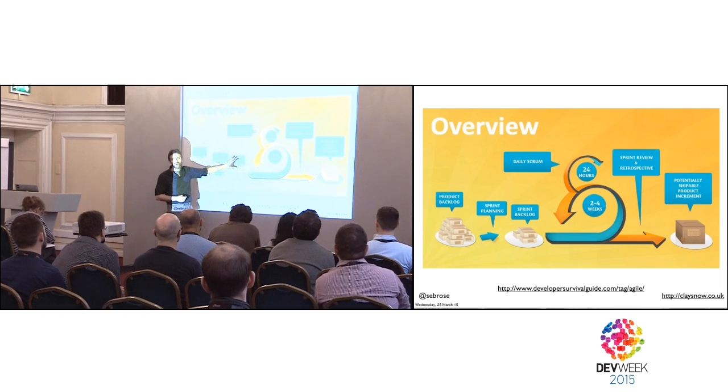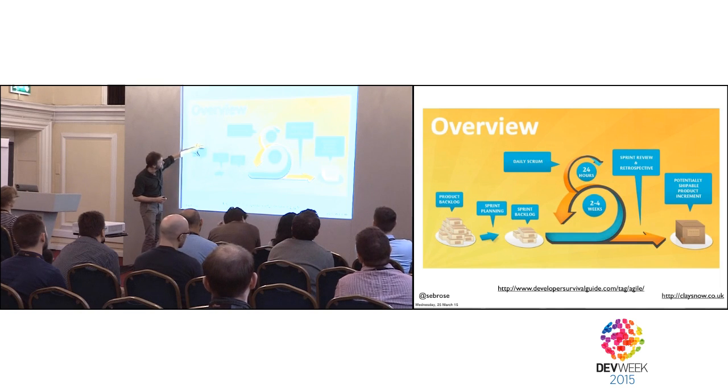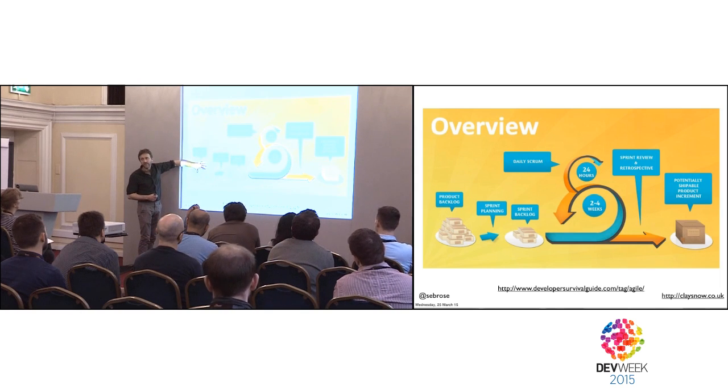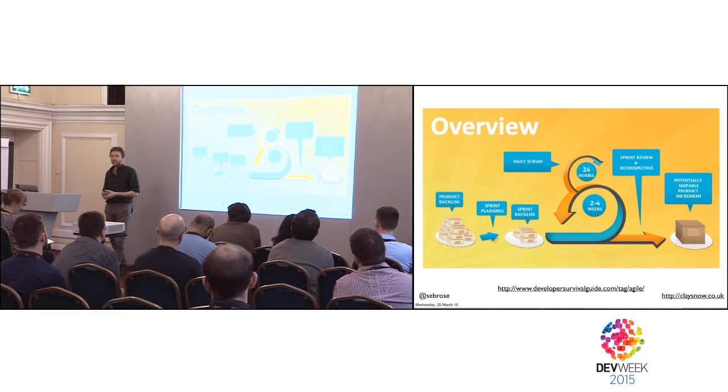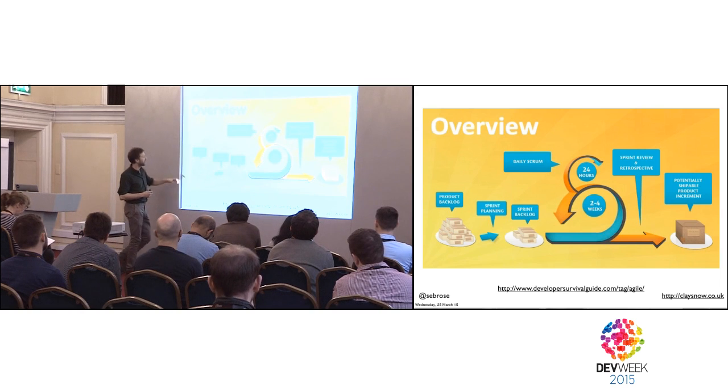And once it's on the backlog, you've done your analysis, essentially. So this is the place where we put the Three Amigos meeting. This is where people replace the backlog grooming, which often includes the story point planning poker game, and they replace that with the Three Amigos.